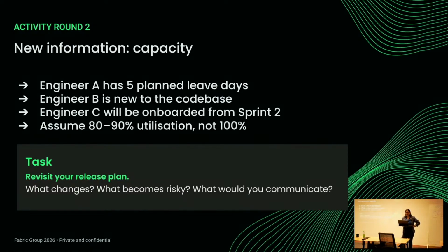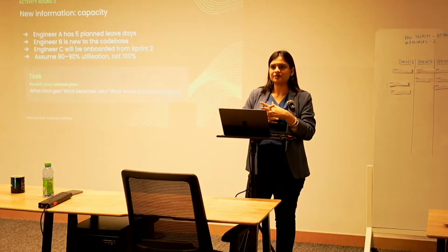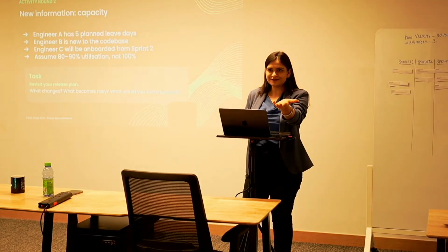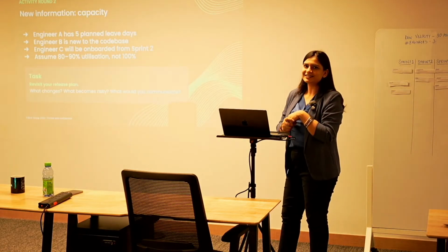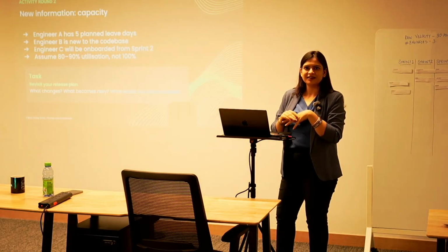I'm not sure why we are not considering QA efforts in there. Somebody has to test. Very good point. QA efforts are technically baked into the story efforts itself. So when you are developing a story, you should be thinking about building it end to end. So right from analysis, what is the effort that goes into that, all the way till it is tested on a stable environment. That effort and complexity should be baked into the story estimate. So we are making that assumption. That's a great call out. Thanks for calling that. I actually forgot to mention it, but that's already baked into the story points. In this case, there's also the definition of story if we are debating about it.